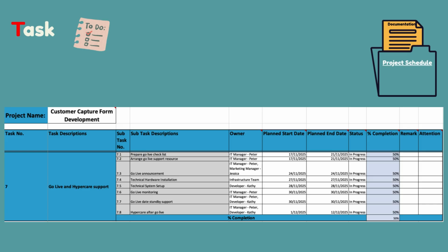Finally, let's talk about hypercare. Hypercare here means to put extra effort and closely monitor in case any issue happens. As issues might come up either from the technical side or user usage side, have your team ready to answer any questions or fix any problem during this period. Normally, it is 1 week or 2 weeks after go live.